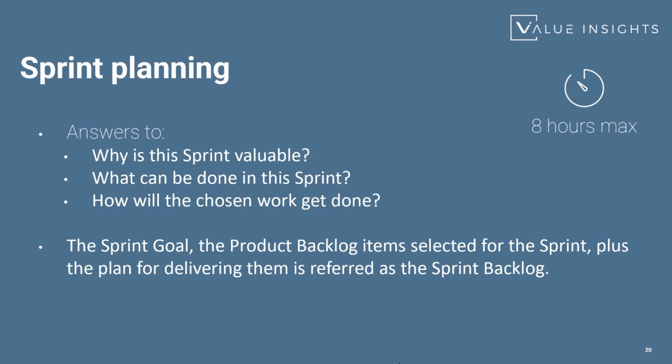Once the items are actually selected, the team will devise a sprint goal. And later on, the developers decide on how they want to organize themselves to complete those sprint backlog items. So they make a working plan for that. In general, this is by taking the items for the sprint from the sprint backlog and breaking them down into manageable pieces, into tasks, as an example.